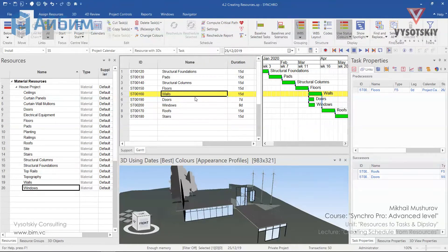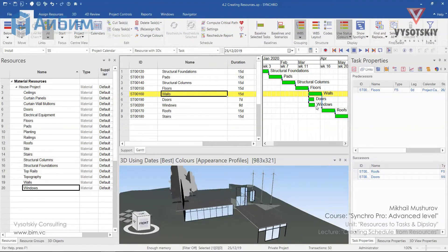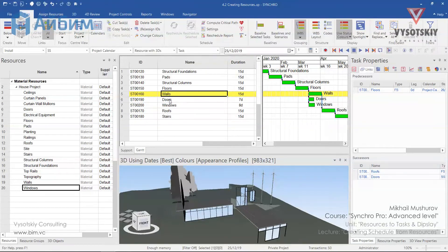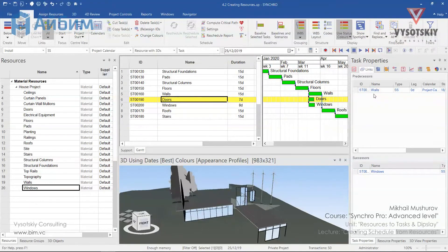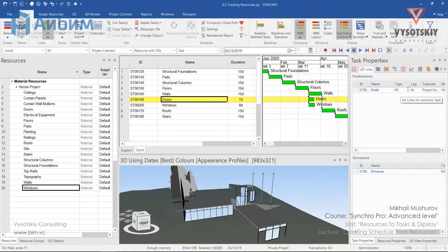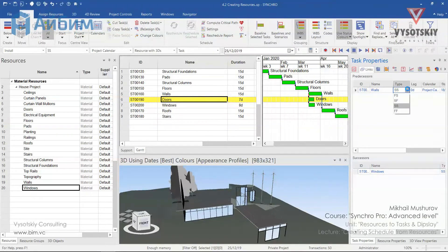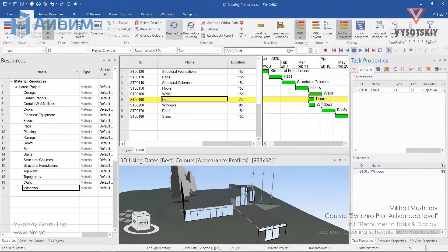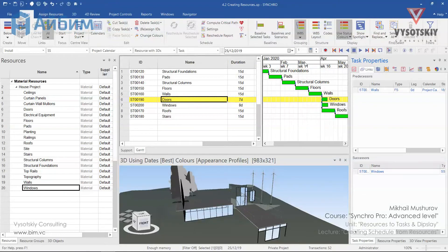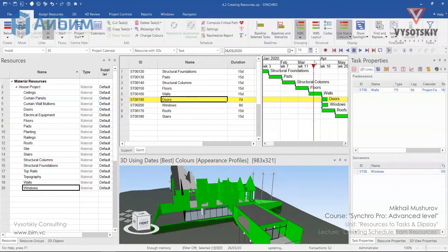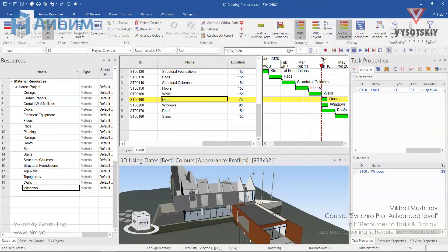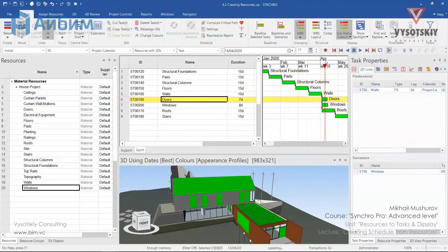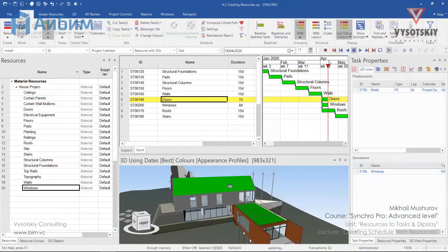Click reschedule. But we have a mistake here. We would like to start doors and windows activities after walls finished. For that, let's change link type. Click over doors activity and change its linkage with walls as finish to start. And reschedule the chart. Now, it seems more correct. After the walls are ready, we have doors and windows installation.